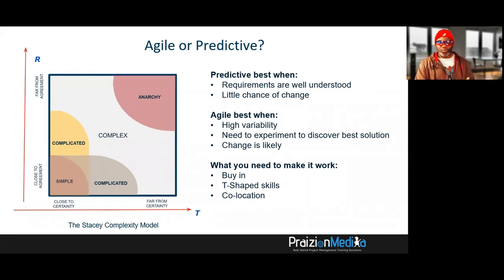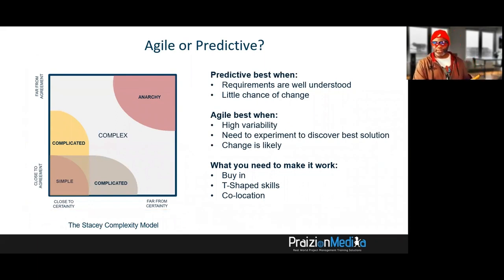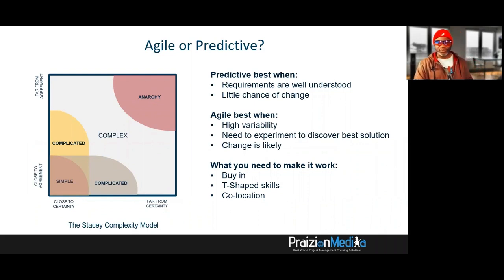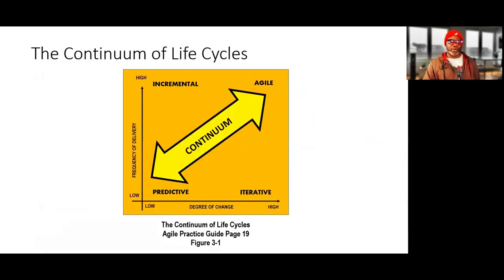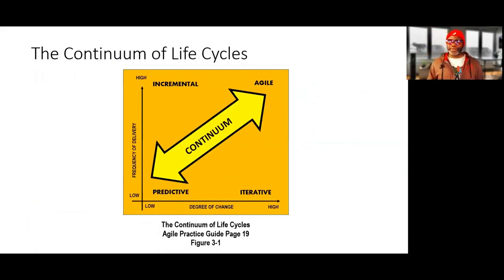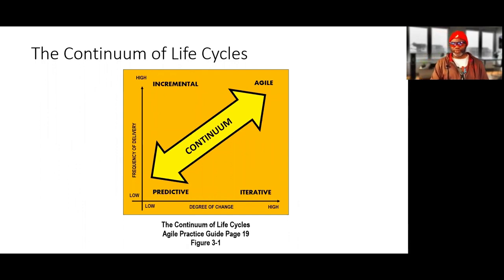Agile works best when there's high variability, need to experiment to discover, and change is likely. Predictive works best when requirements are well understood. The continuum of life cycles shows when to use predictive — low degree of change, low frequency of delivery — and when to use Agile — high degree of change, high frequency of delivery.